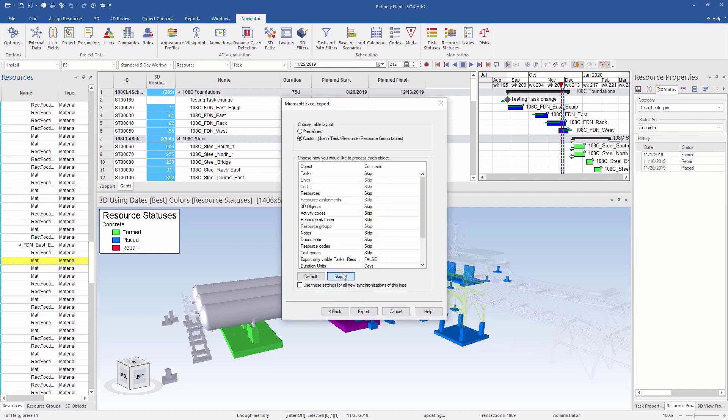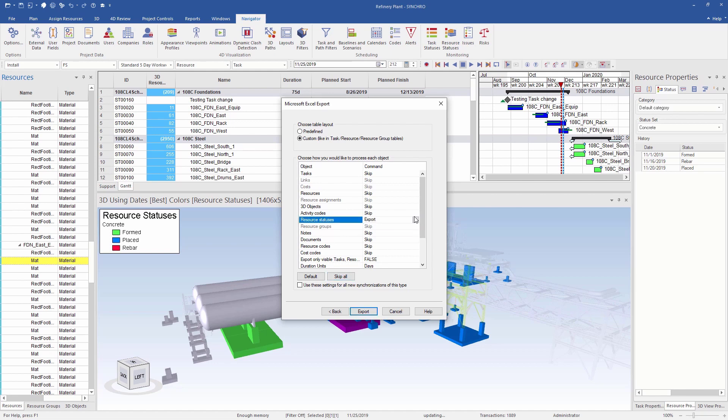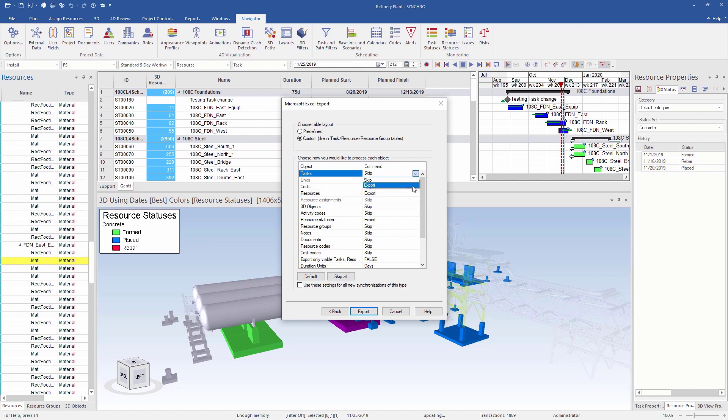On this menu, I have the flexibility to only export the data I actually need and skip the others. I need resource statuses and for additional data, I will select both resource and task options as well. All this will help me create visuals to track planned versus actual concrete production. I can save these settings to be reused in subsequent exports.